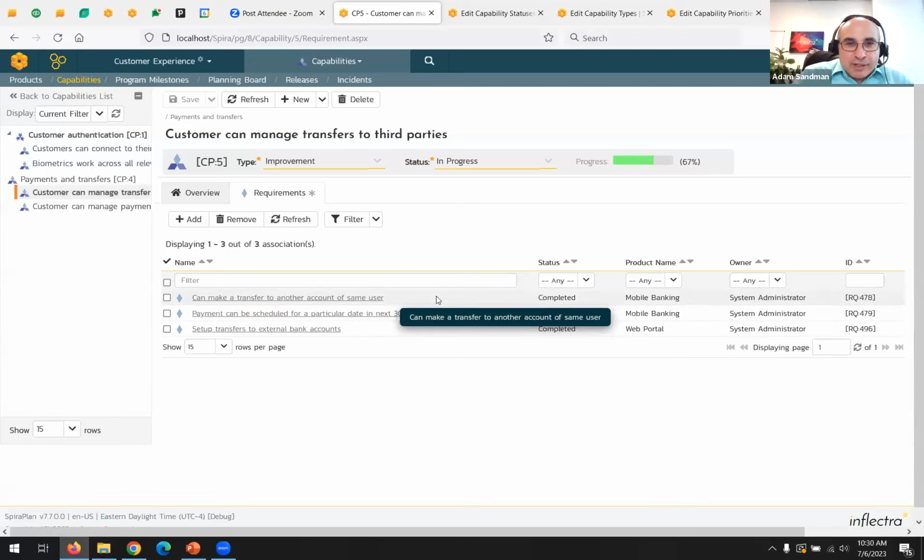If you are an agile methodologist, story points are only valid within a team. They're relative to other story points in a product. They're not valid across products. So those estimates didn't make sense. So we decided to keep it simple, in line with what we've done at the program and portfolio levels already with our current reporting. It's one requirement, one vote that updates to the capability.